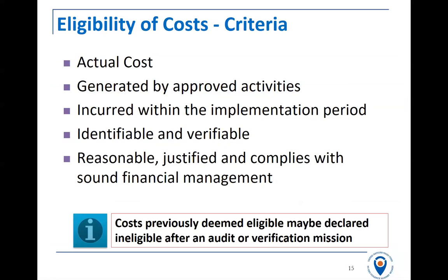For example, if you are working with a partner and have sub-granted advance funds, this sub-grant should not be included in the financial report until after you have received the supporting documents from the partner and cleared the advance, as the financial report is cash-based and not accruals-based. The only exception will be at the end of the project for the final external project evaluation. In this case, the organization may include incurred expenses related to the final evaluation in the final financial report. And we can get back to you on that closer to the time.